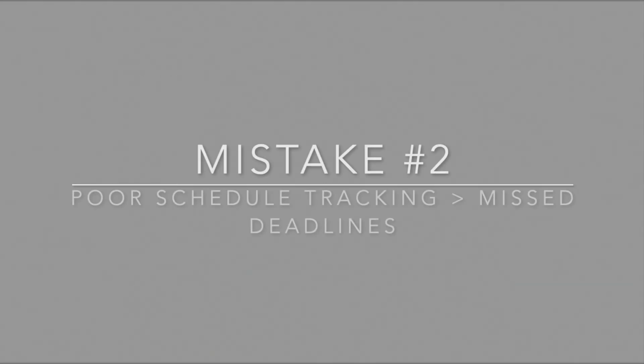Mistake number 2, missed deadlines. A delay in pouring the foundation can push back framing, but if you're not tracking progress, you won't see it coming. Studies show poor schedule tracking causes 40% of construction delays. That's a huge hit to your timeline and reputation.